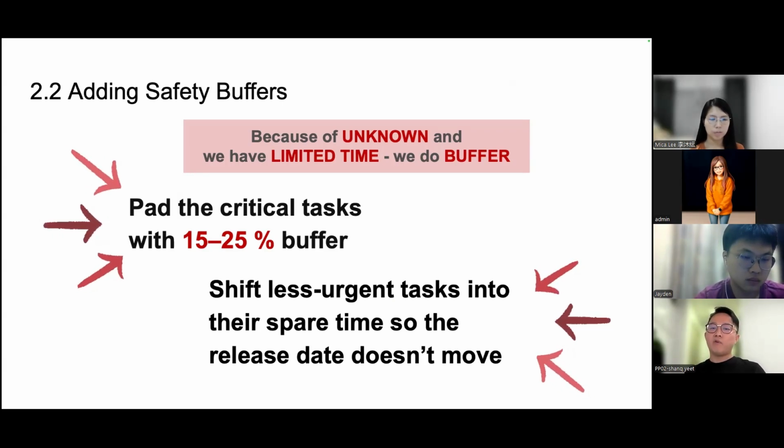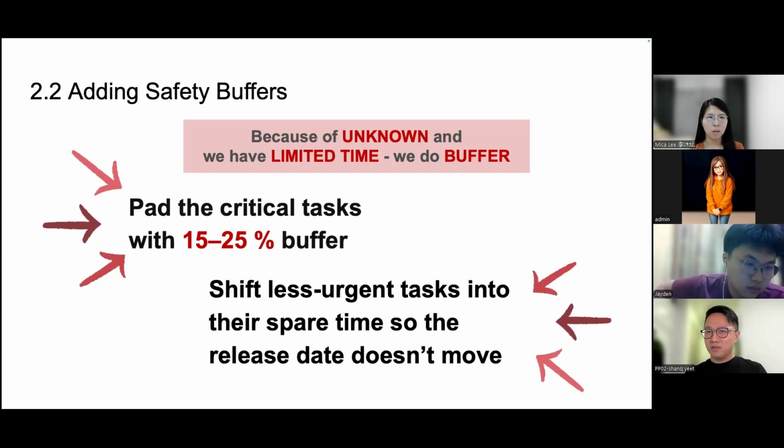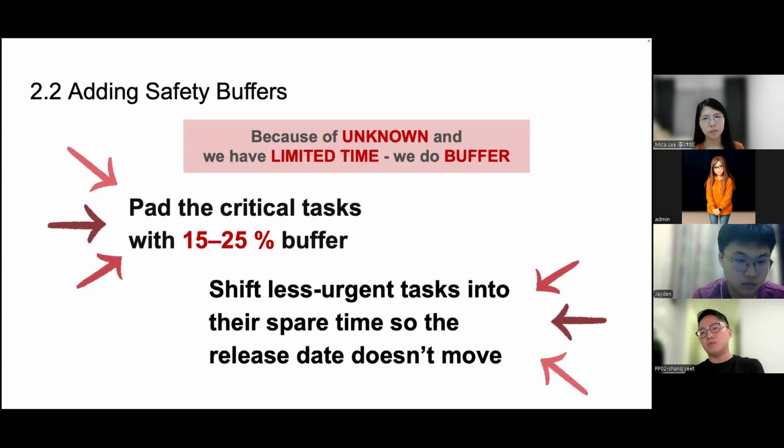And why? From my experience in app development, we tend to be overconfident on what we can build and tend to underestimate the problems or the bugs or the issues that arise during the development process. So whatever we estimate earlier, it is better to be more conservative, to add on another 20% time at least to the time you budgeted and estimated. So you make sure you have time to fix problems. But let's say you finish everything on time, that's good. You finish your work earlier. Nothing bad will happen, right?